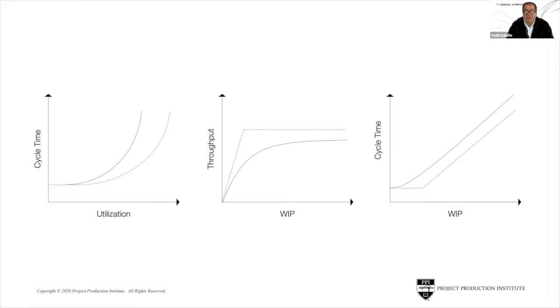In the meantime, you're significantly increasing costs and the use of cash because you believe that we could actually get more done if we put more in. And so again, on the manufacturing side, what we call industrialized construction, takt time is what is the demand. Cycle time is how fast can we produce. Those are the interesting measurements. You can't change the throughput and you can't change the cycle time.